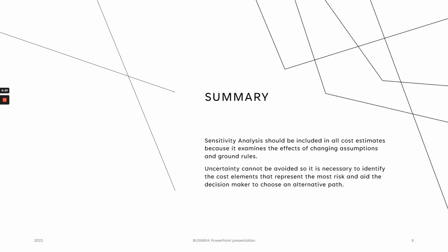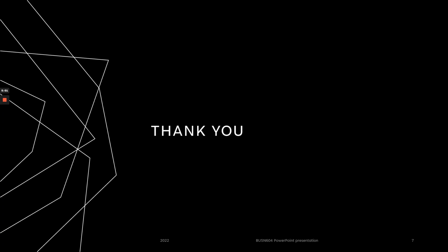So, in summary, a sensitivity analysis should be included in all cost estimates because it examines the effects of changing assumptions and their ground rules. And also, uncertainty cannot be avoided, so it is necessary to identify the cost elements that represent the most risk and aid the decision maker to choose an alternate path if they deem that is necessary.